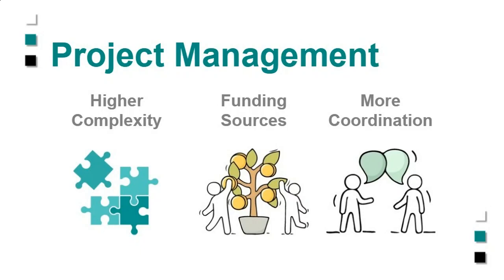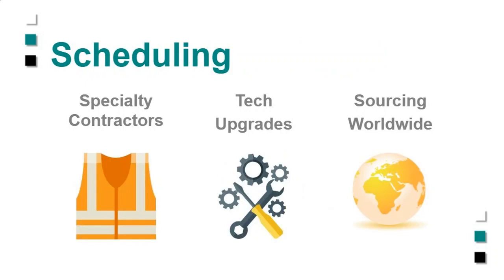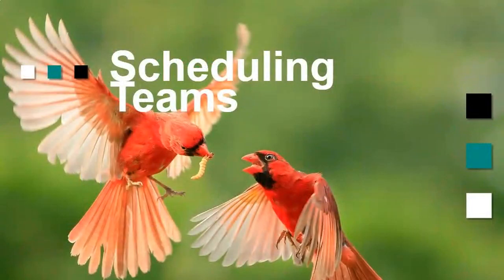That means the schedules are much more important to running the projects, but updating them becomes more challenging as well, especially if you have multiple contractors, some who may not be that strong on project management. They may be all over the world, in which case getting together to do updates could be challenging with time zones. And people using different software can be a real challenge. So the scheduling team has to accommodate all that and keep the schedules moving ahead, and that's not always easy to do.